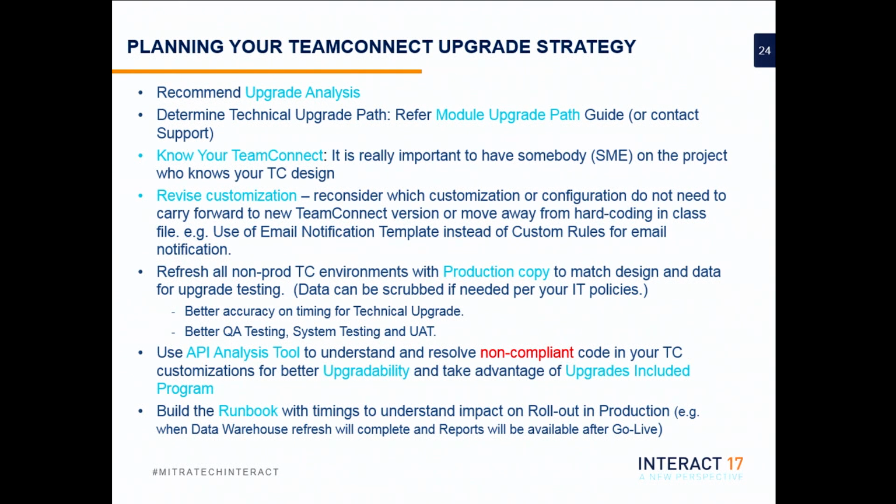All right. So, as professional services, the first and foremost thing I would recommend you do is the upgrade analysis. That is why we send the questionnaire form, so that we can understand how your TeamConnect is set up, and then understand the technical upgrade path from your current TeamConnect version to the next version, because as part of the technical upgrade, 50% of the problem is that if you take the wrong step, you are going to fail your upgrade.